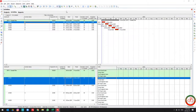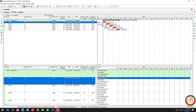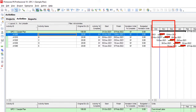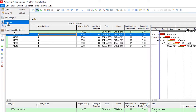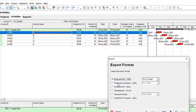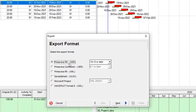If I schedule it to the next week you can find that I have two Gantt charts. The first one is referred to the current project and the yellow one is referred to my baseline. So right now I want to export the project. The first option for export is Primavera P6 XER file.